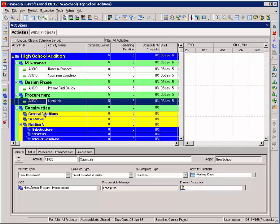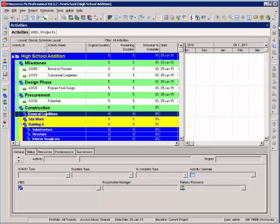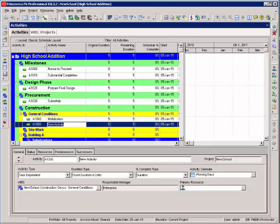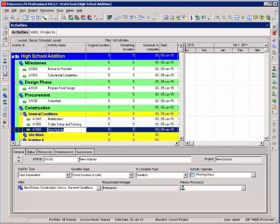My next activities are in construction under general conditions. I have an activity for mobilization. I can hit insert and add a new activity. Trailer setup and an activity for final claim.